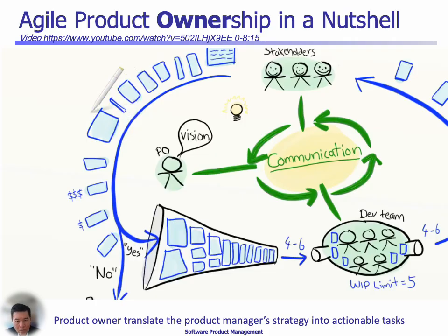Think of any system that you've used, and I bet you can think of at least one really simple feature that is very important, that you use every day, and I bet you can think of at least one huge complicated feature that is totally unimportant. Value and size is what helps Pat prioritize intelligently. Like here, these two stories are roughly the same size, but have different value, so build this one first. And over here, these two stories have roughly the same value, but different size, so build this one first, and so on.